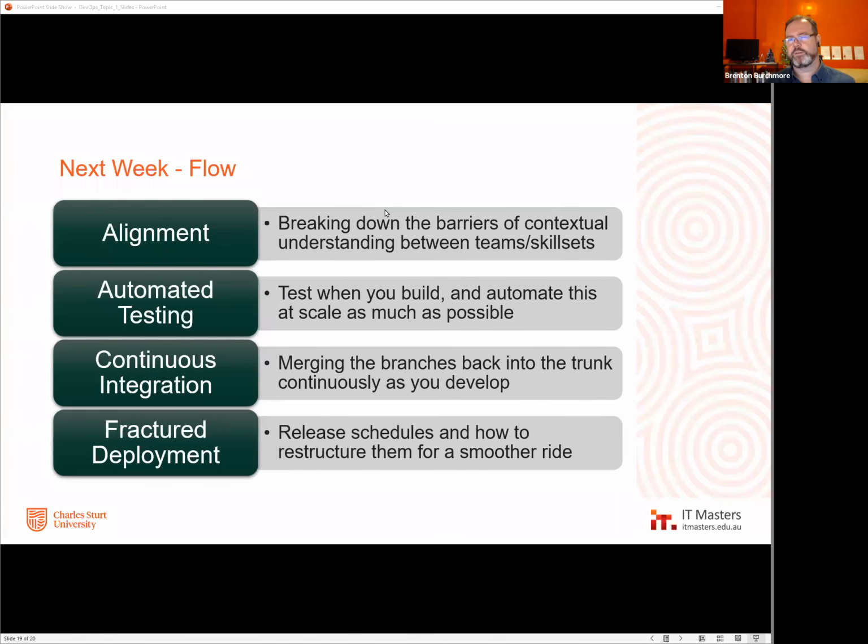So I don't think first in, first out is usually going to be the way things work, unless you're doing a self-contained project and people are running a number of sprints and they get to decide that I want to do this bit now and I want to do that bit later. But even then, that's still a negotiated thing, because at some point you need to do incremental billing for what you're producing. So there's still a release timetable for features and capability that has to be answered to. So there is definitely prioritization, and there are definitely stakeholders involved in that.